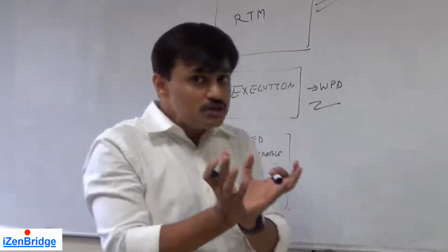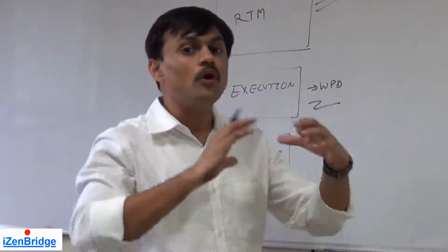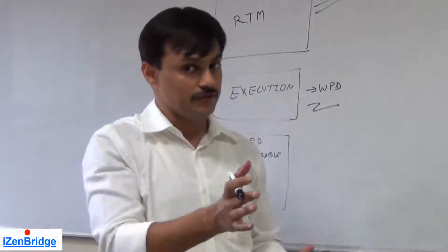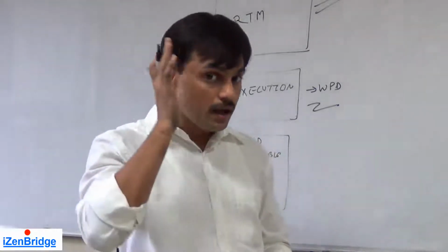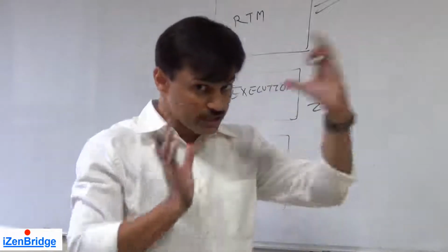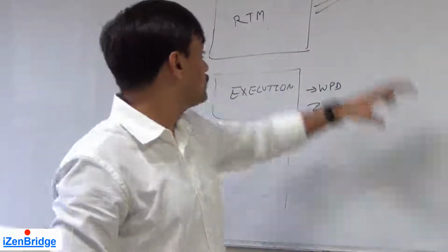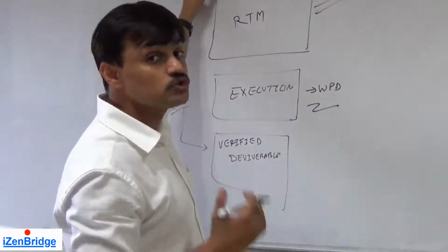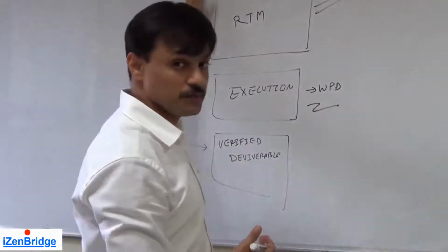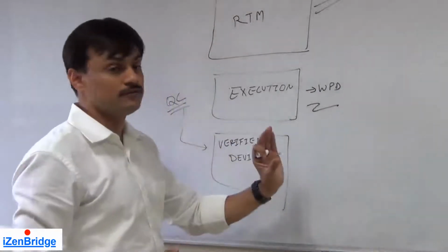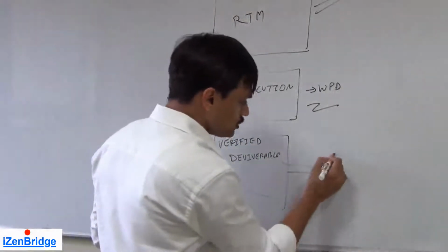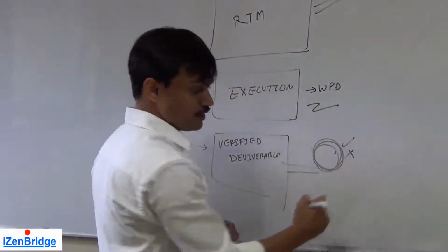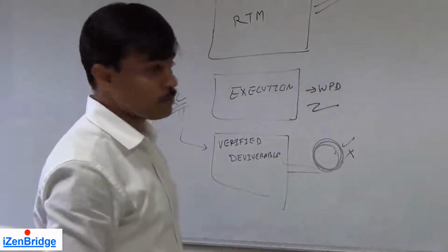In execution, we first create the deliverable, the project team works on it and verifies that this deliverable, as per the project team's knowledge, skills and understanding, is meeting the requirements which the customer has expressed to us and meeting the scope which we have baselined in our project management plan. So we take a verified deliverable as an input. This is a deliverable which we need to check and say, is it working good or is it working bad as per our customer or sponsor.